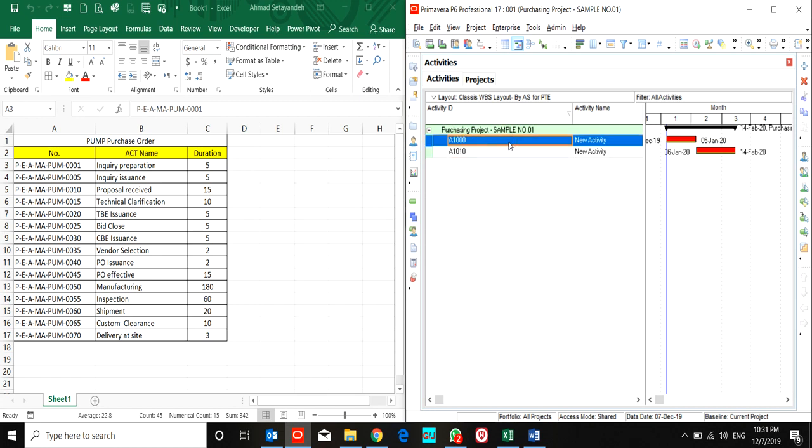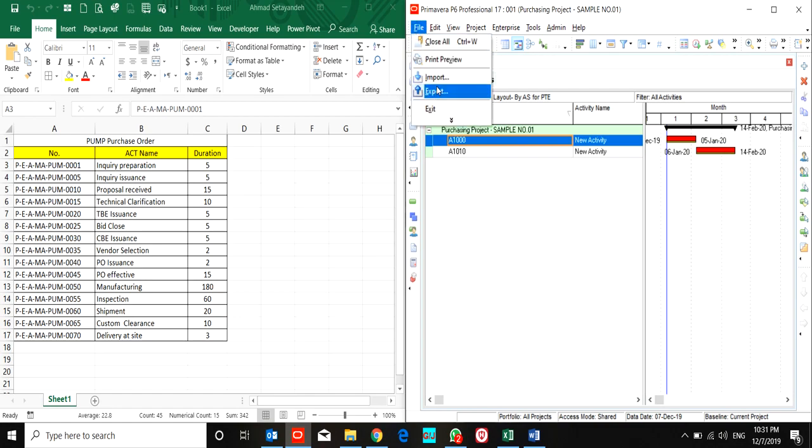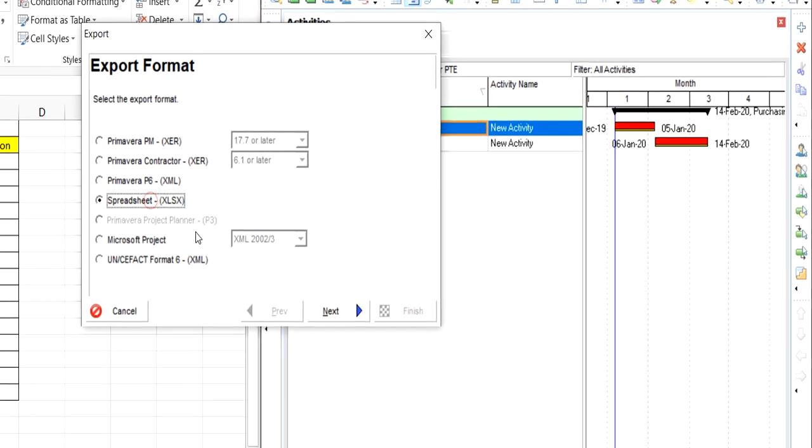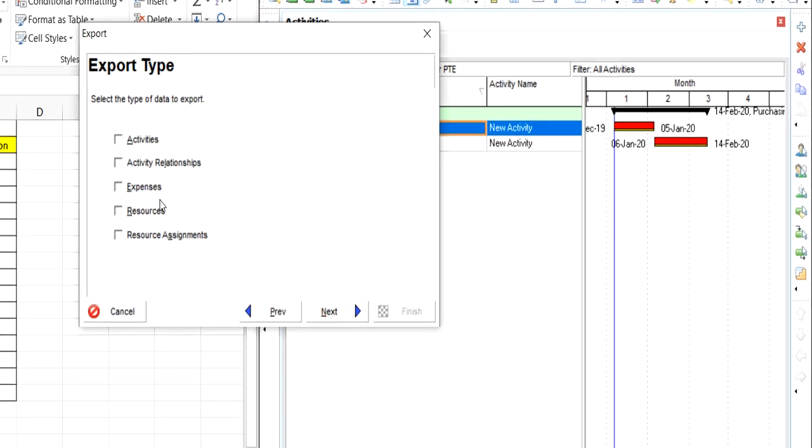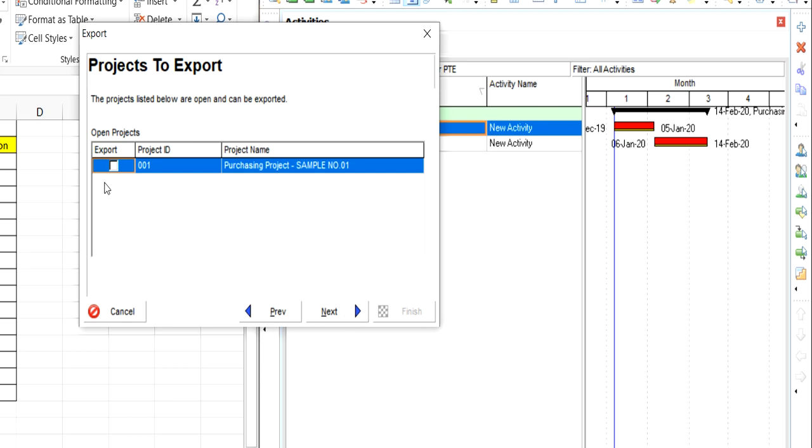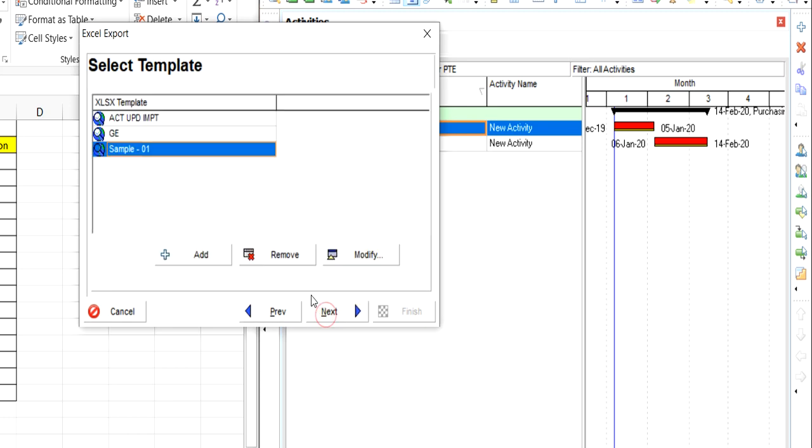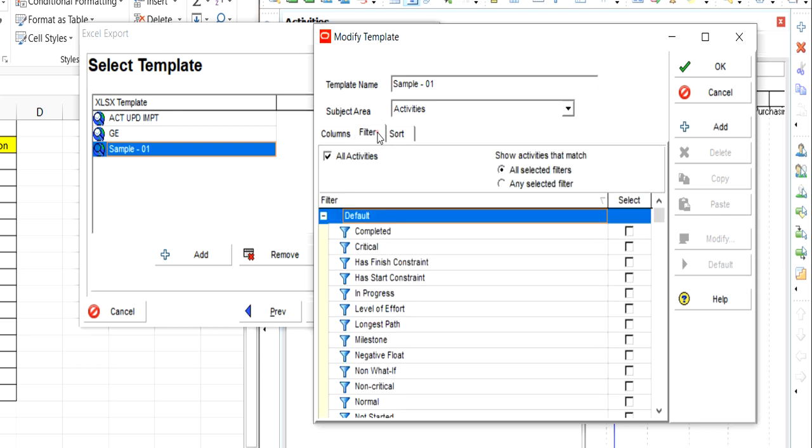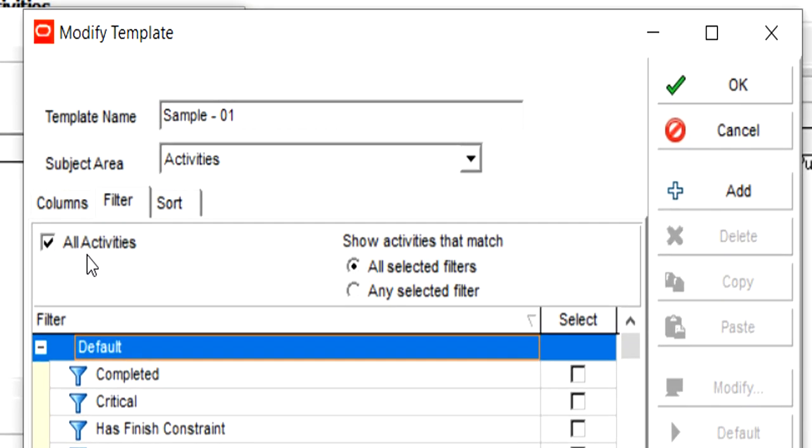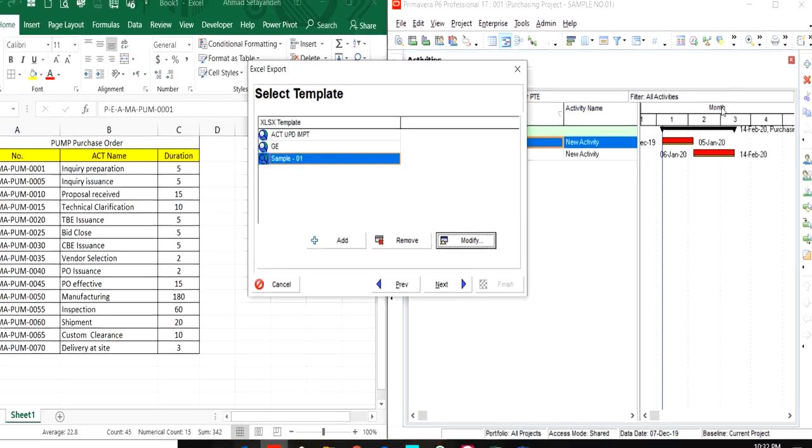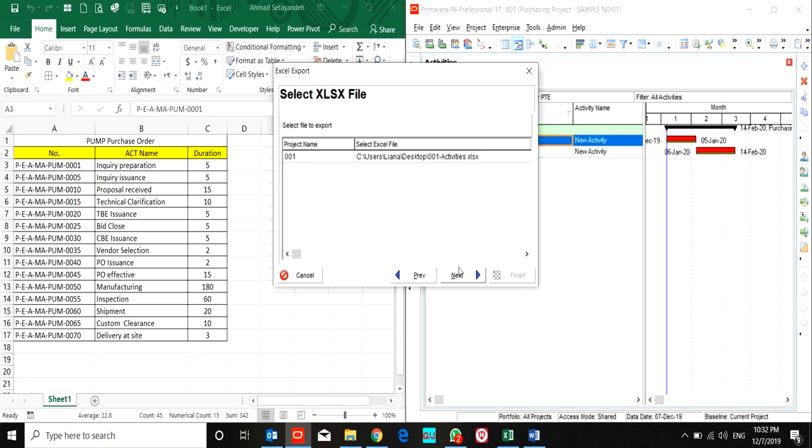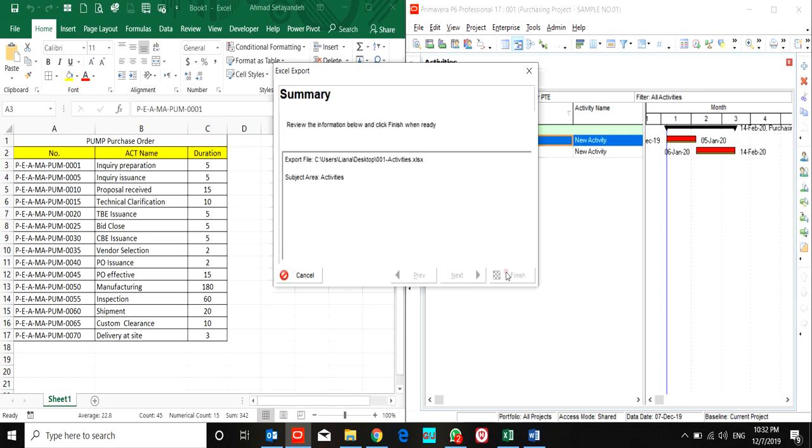I'll export and select only activities, then check export and modify these fields: activity ID, activity status, WBS code, activity name, and original duration. These fields are enough for our purpose. I check the filter to avoid any filtration in this project. All activities done, okay, and I exported my file.